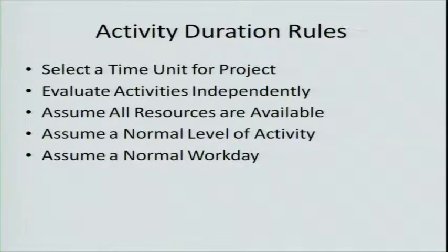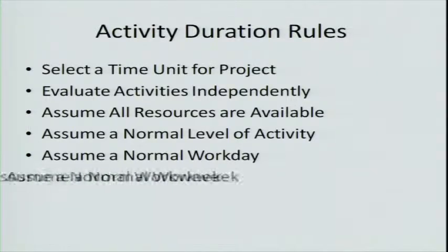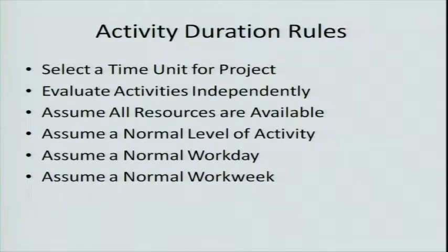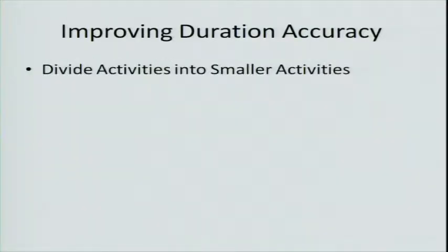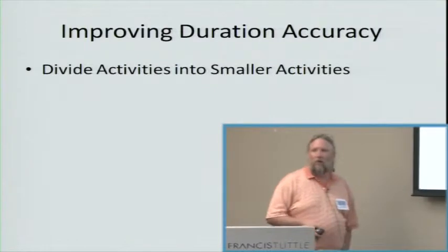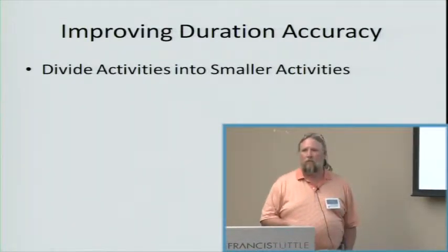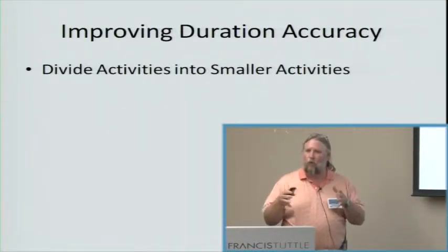Assume a normal work day, 8 to 5, or 8-hour day. Assume a normal work week, 5 days a week. Okay. How can we improve these durations? Well, we can divide them into smaller activities, right? We break them down into smaller activities, we get more control over it.